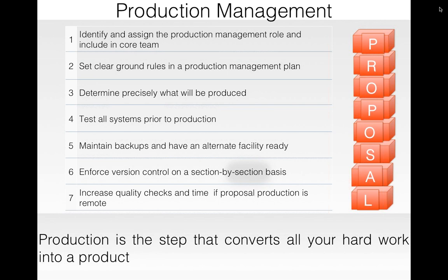So the timelines and the quality matter. It may say that the proposal has to be printed only on recycled paper. Most green-conscious, sustainability-conscious government agencies make it a point. They may ask that proposals be submitted electronically on USB. They may say the proposal may be submitted on 3 different USBs, one in PDF and the other two in Word document. So there can be different guidelines, and those guidelines should set the ground rules for the entire production management plan.